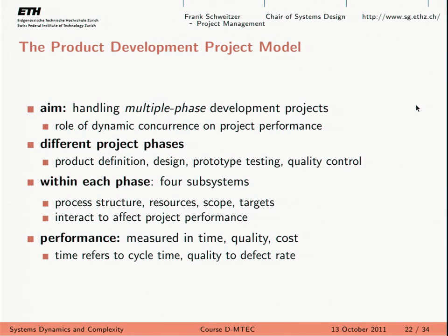But what if all these different phases, conceptualization, design, development, and decommissioning of your project, for instance, all these phases, they don't need to be sequential. And in fact, this goes into the direction of concurrent development. Some of you may be familiar with this. So you do part of the design phase at the same time with, let's say, part of the production work needed. Right? So these different phases do not need to happen sequentially.